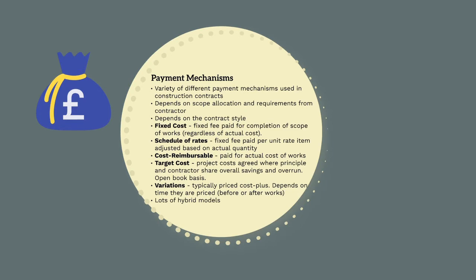Fixed cost is one of the most common forms of payment mechanisms. It means the principal pays the contractor a fixed lump sum to complete a given scope of works — the contractor is paid a fixed fee regardless of the actual cost. So if a contractor quotes $2 million to build a bridge, they get paid $2 million, regardless of whether the bridge costs $200 million or $200,000 — assuming, of course, that the scope remains the same. Fixed cost contracts result in the greatest risk transfer to the contractor.